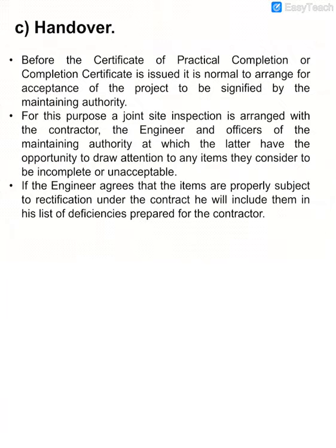If the engineer agrees that items are properly subject to rectification under the contract, he will include them in his list of deficiencies prepared for the contractor.